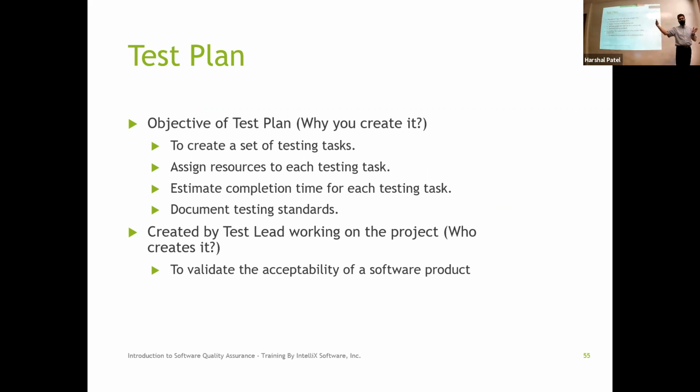Well, a lot of inspections have associated fees. So how much is each of the fees going to cost me, so that I can put together and say, okay, it's going to cost me this much to build or construct the house, and it's going to cost me this much to test and inspect and get it passed through the necessary regulations so that it is considered a livable house. Same thing goes into the software system.